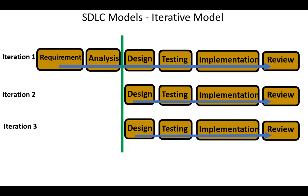If there are any errors found, the process starts again from the requirement gathering. The main difference between the incremental model and the iterative model is that an iterative process makes progress through continuous refinement, while an incremental process makes progress through small increments.